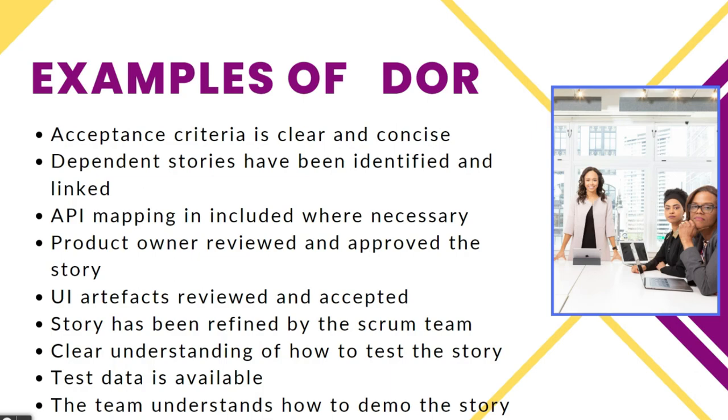UI artifacts reviewed and accepted. This is what I was talking about earlier. So if you have UI elements or UX designs that need to be a part of the story, then that needs to be reviewed with the UX team and the development team, of course, front end developers, maybe mobile developers, to make sure they can actually do it. So this is a part of your refinement conversation.